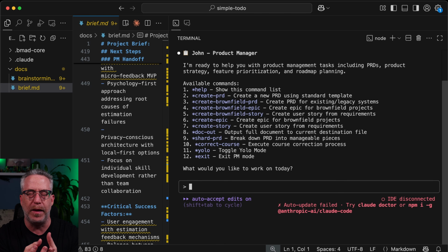What is the basic thing of this core? But the PM here will also capture your other ideas, and if they're not part of the MVP, we'll still hold on to those, and those will be post-MVP epics that you might do after the main build. So again, what is most important here? It helps us maintain MVP scope. It gives us the functional and non-functional requirements with the epics. And then the third most important thing, but really kind of the key to the whole BMad method, is in those epics, it is going to create the user stories. But more specifically, it knows that we are creating these for very, very dumb developer agents.